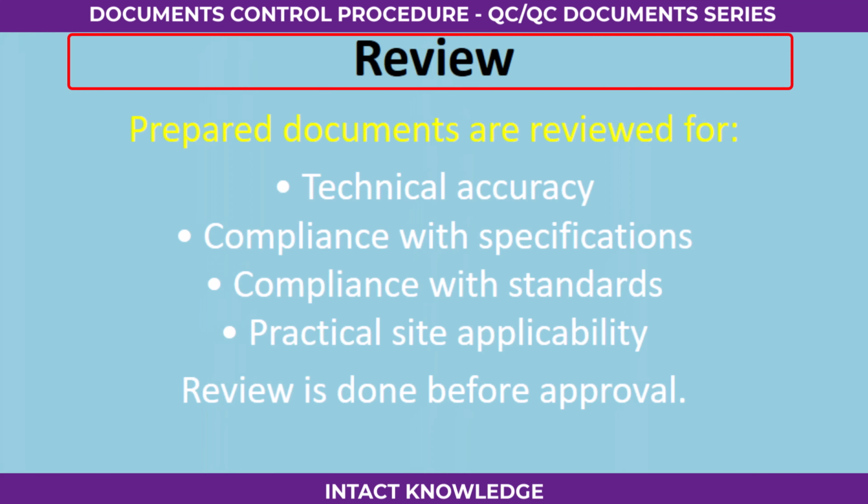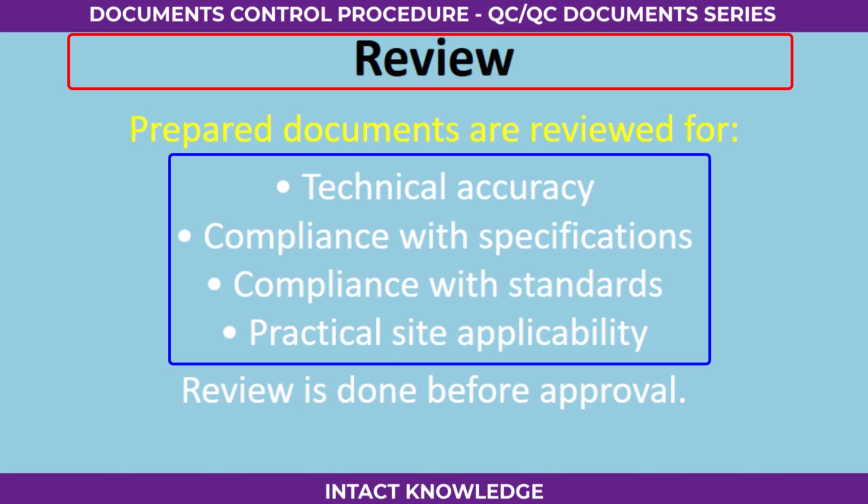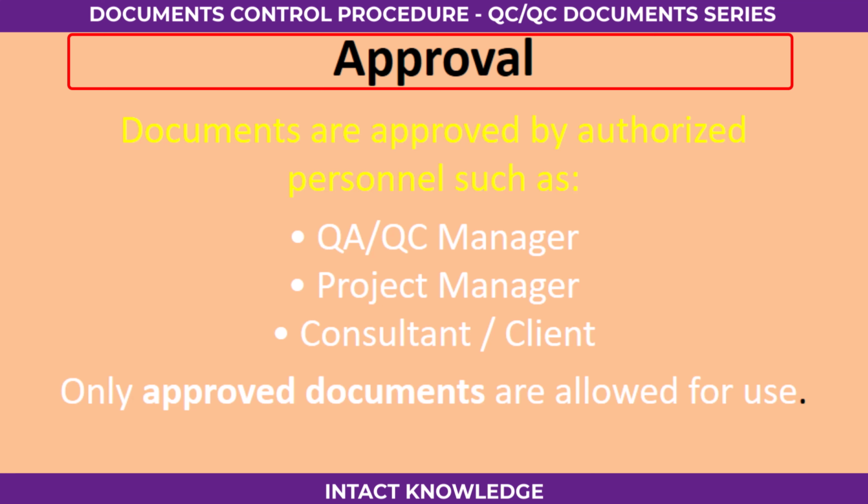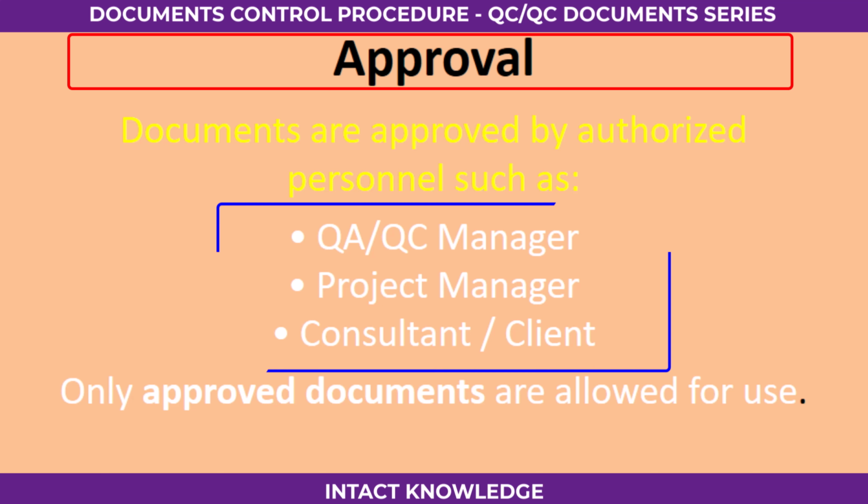Number 2, review. Prepared documents are reviewed for technical accuracy, compliance with specifications, compliance with standard practical site applicability. Review is done before approval. Number 3, approval. Documents are approved by authorized personnel such as QA/QC manager, project manager, consultant, client. Only approved documents are allowed for use.